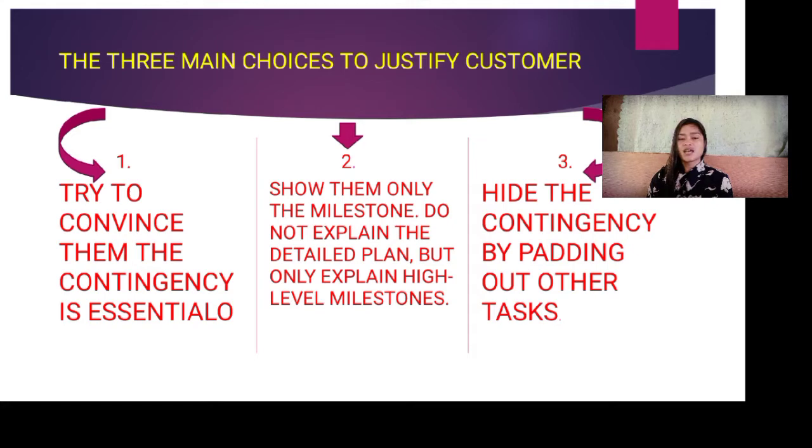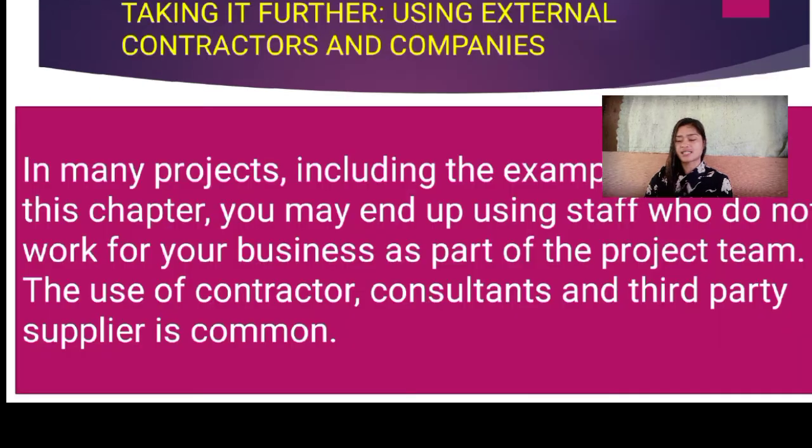The first, try to convince them that contingency is essential. Second, show them only the milestones and do not explain the detailed plan, but only explain the high-level milestones. The third, hide the contingency by padding out other tasks.